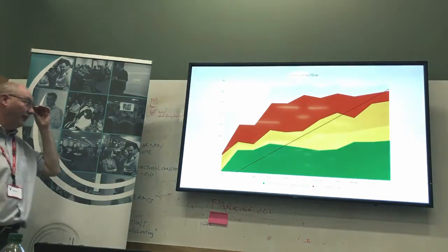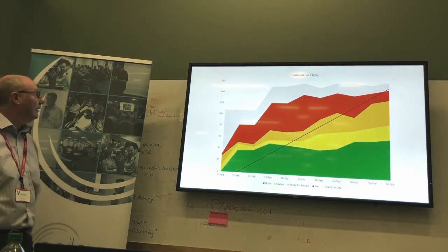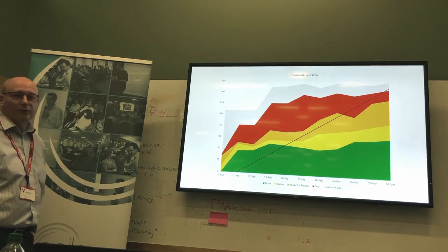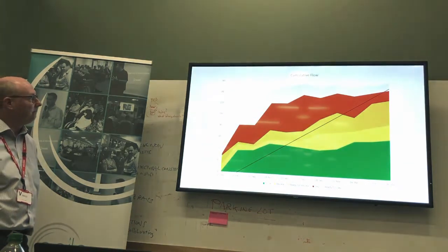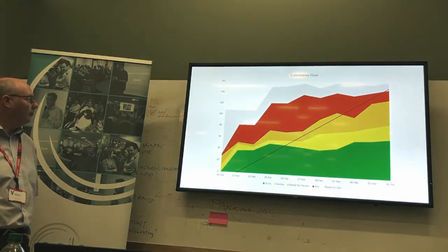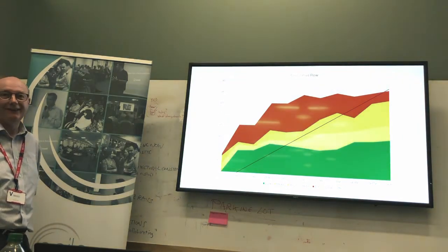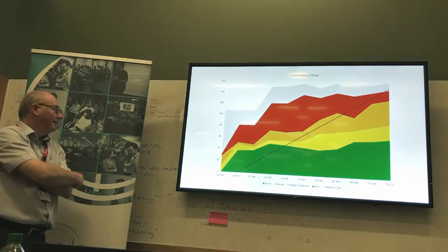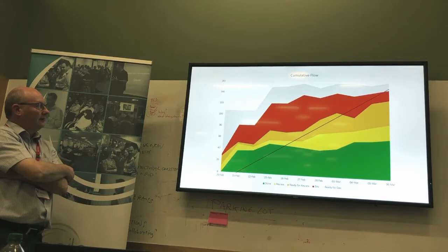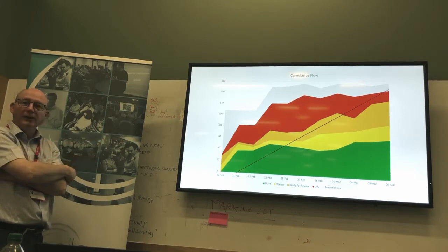Looking at the length of the sprint and the dates, this is the same team. So what do you reckon? Lots of carryover, right? Yeah, it's 50 points of carryover in progress. And then midway through, about two days in, they get around to doing their backlog and add all the stuff they wanted to report into that sprint, which is an additional 50, so half of it. It's just completely out of control, isn't it?